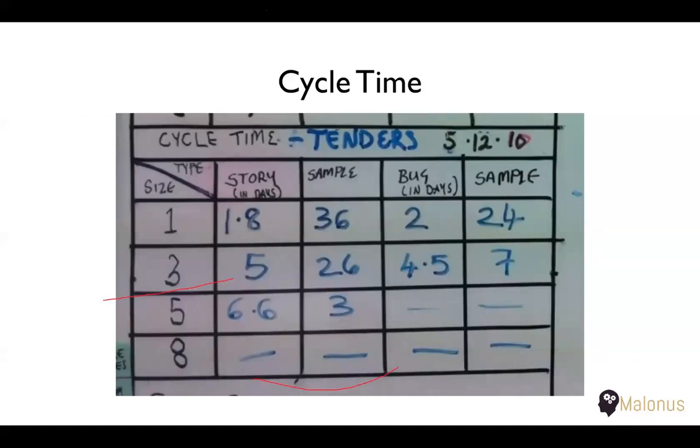But you see other things like a 3 point card is finished in 5 days. So you get some understanding of how many days a particular card really takes. Again, we are not trying to map the story point with the days implicitly, but we are trying to see how much average time it really takes, which is really helpful.